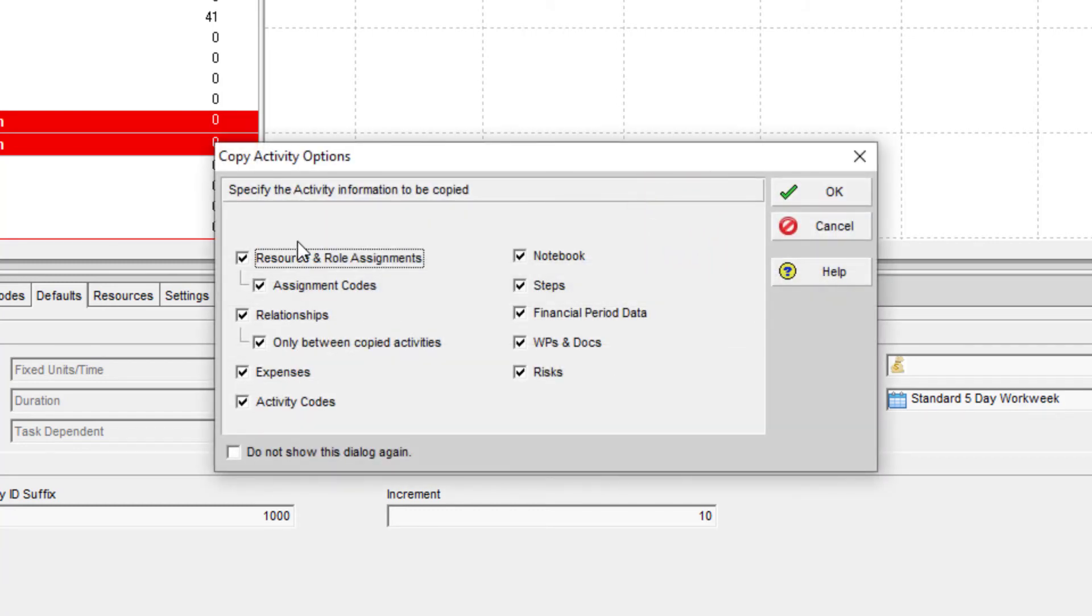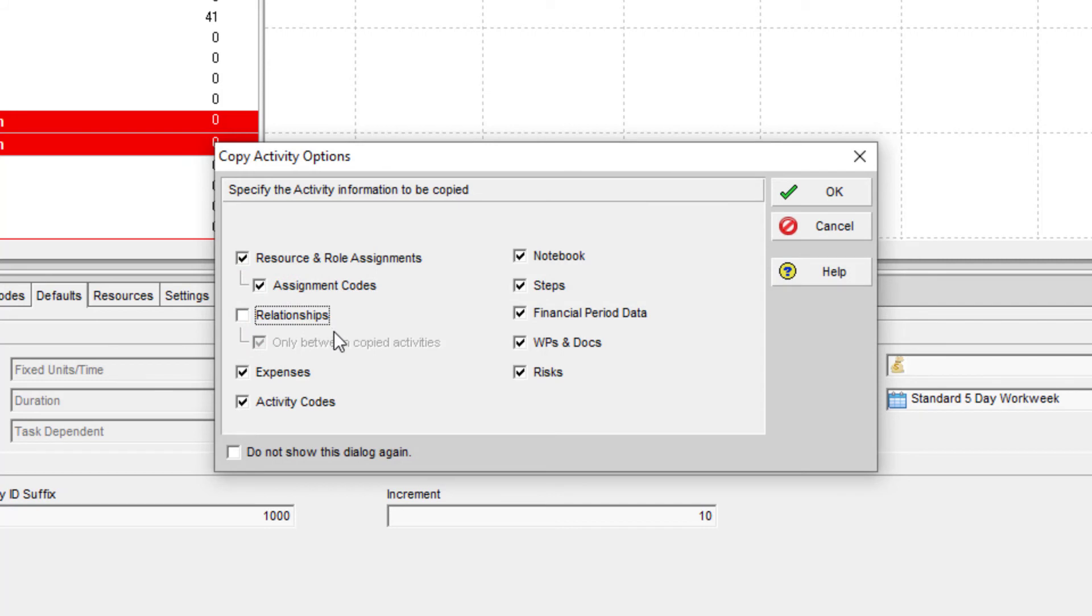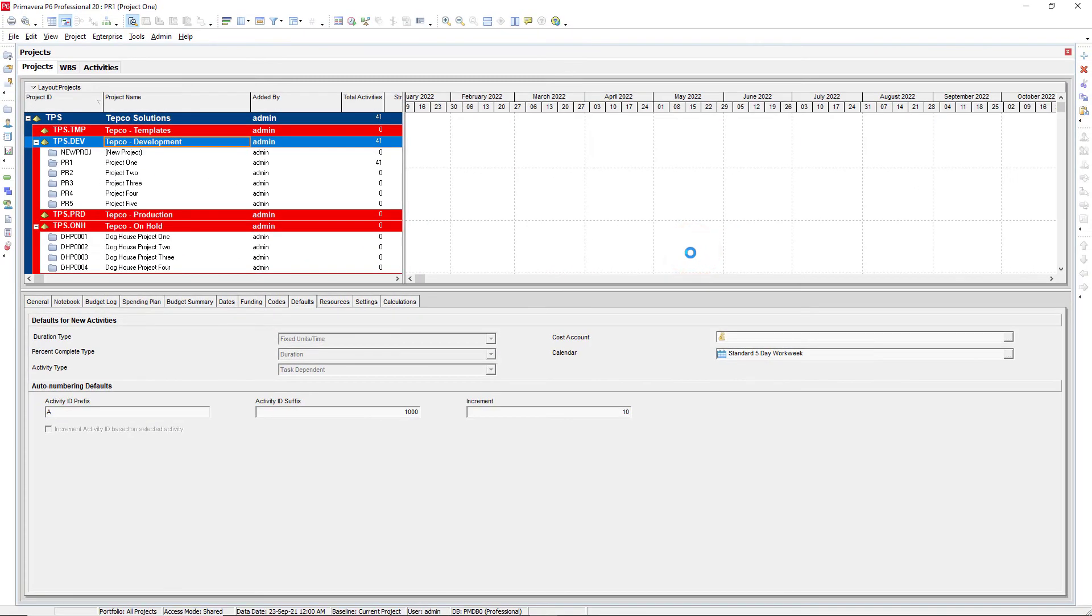But when we get to this next screen, notice this relationships tab, what we can do is we can uncheck this box. And when we hit okay, it's going to copy that project, but it's not going to bring across any of the relationships. So let's go ahead and do that.